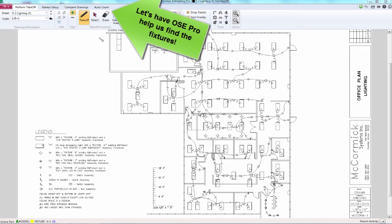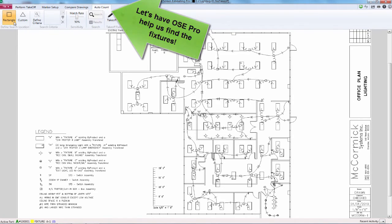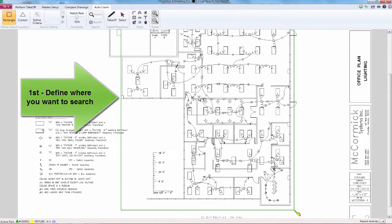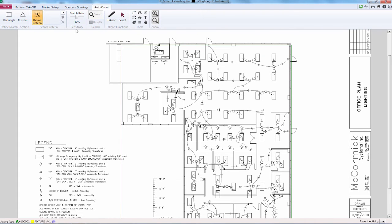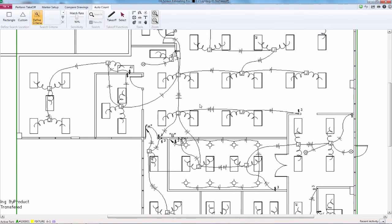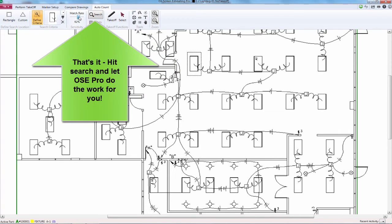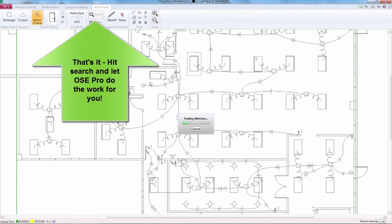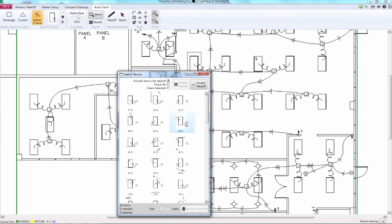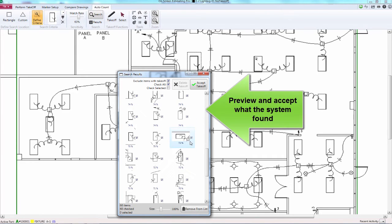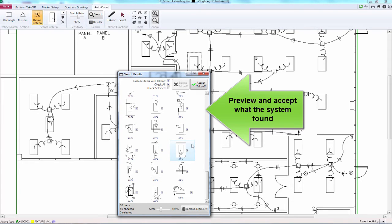Want to save even more time in takeoff? Have McCormick's Effortless Auto Count feature do the work for you. Click on the Auto Count button — it's a two-step process. First, define where you want it to search. Second, define what symbol you want the program to search for. Then hit search and let OSC Pro do the work for you. McCormick gives you a preview of everything it found. Finally, you can review and accept it for a complete and instant takeoff.